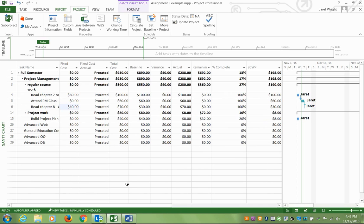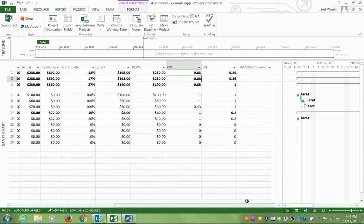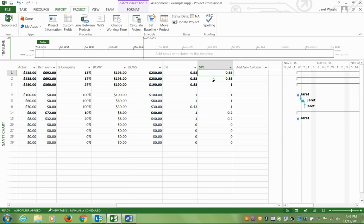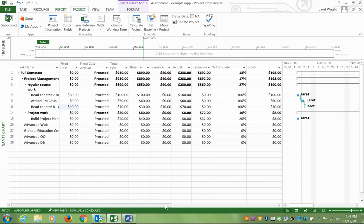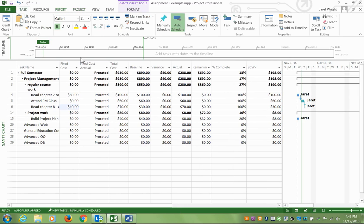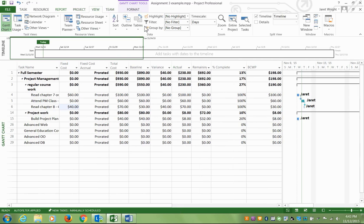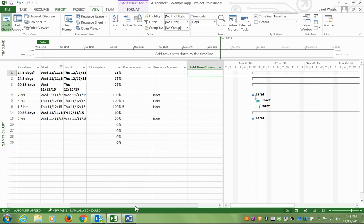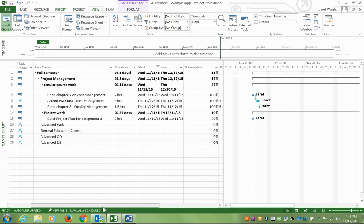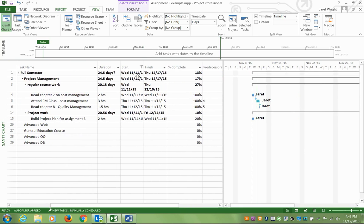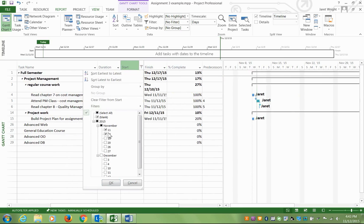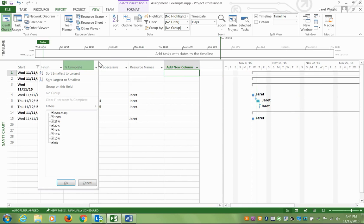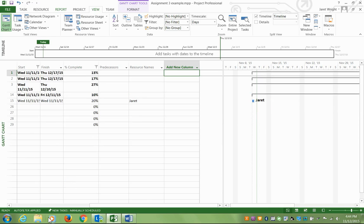That's basically what I need you to report in your weekly summaries. What did I achieve since the last week? What am I going to do next week? And what's my CPI and SPI? If these things are less than one, whatever you've got in your plan, you're basically a little behind schedule. You have to watch it carefully. If you're looking at this like it might be a daunting amount of work, it's not. You're going to filter for whatever the current, up to the current date. And then, you're also going to filter for things that are not 100%. So, if something's 100% done, you don't need to look at it anymore.